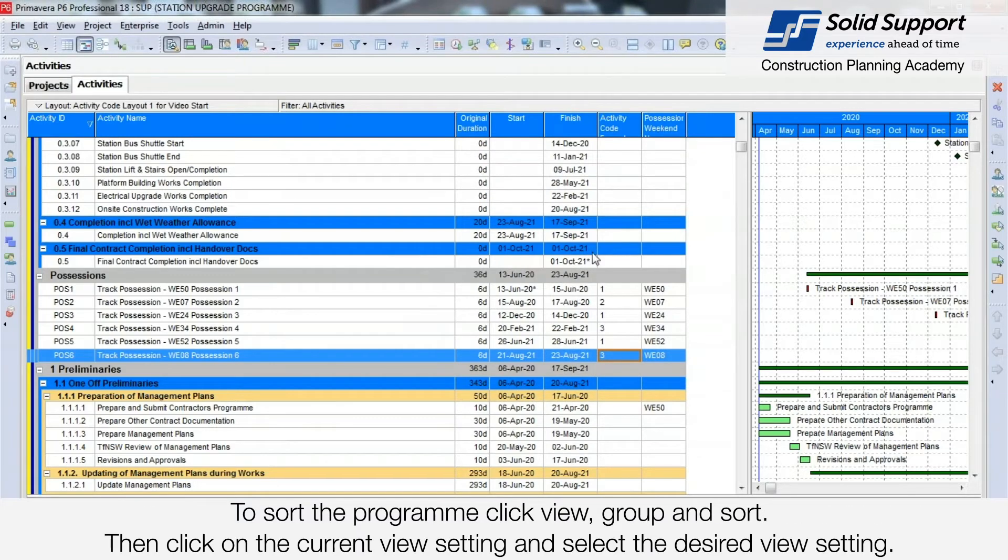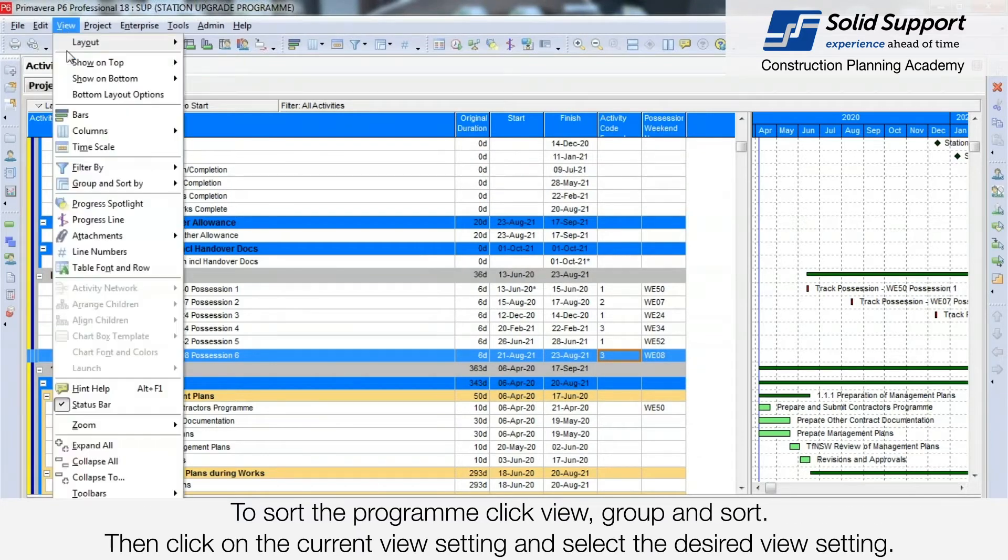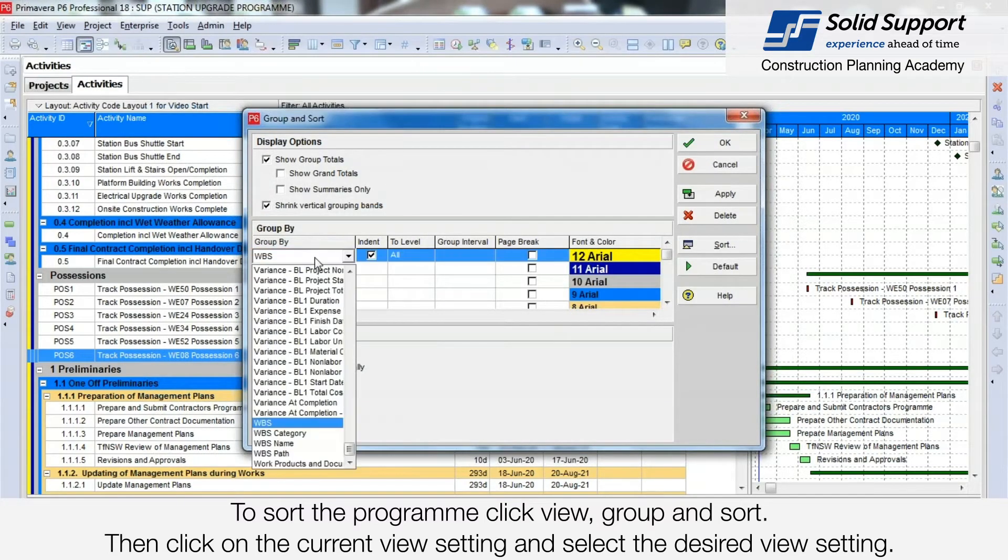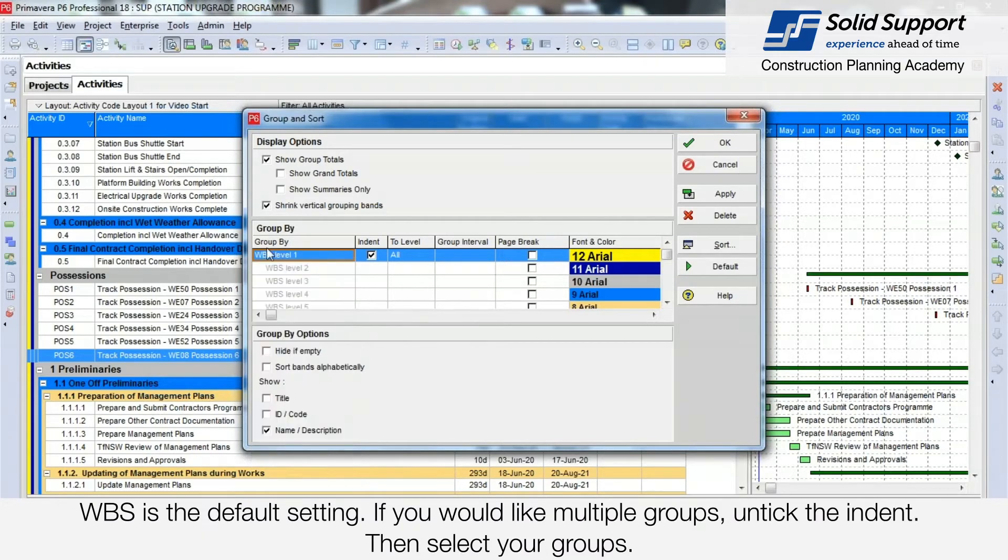To sort the program, click on View, Group and Sort. Then click on the current group setting to select the desired setting. WBS is the default setting.